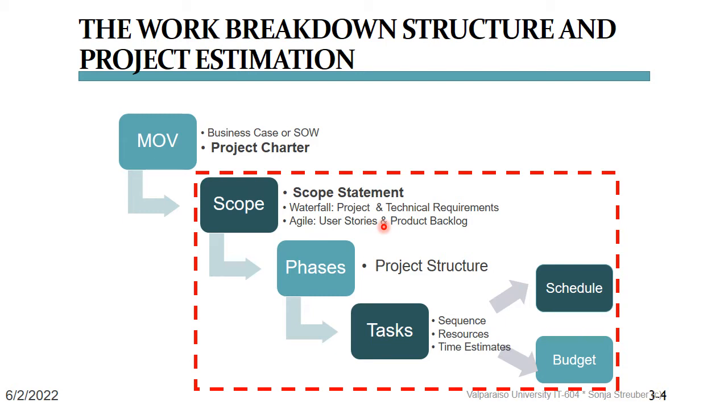That said, though, especially in a hybrid environment, use cases and detailed requirements are often developed and approved at a quality gate or milestone long ahead of any design considerations. This is mostly to ensure that test case and test script development can happen in parallel with the actual software development lifecycle.